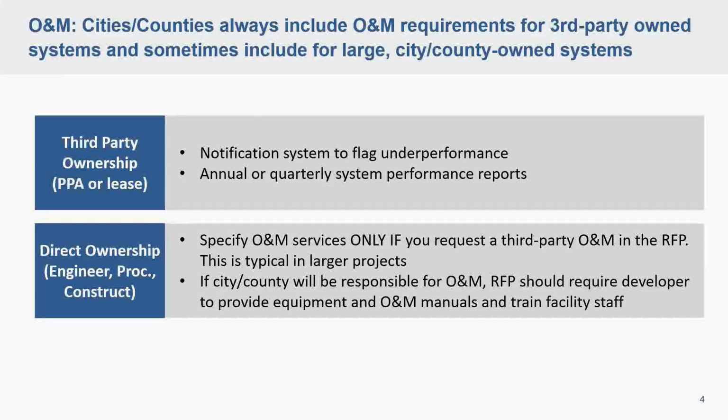So either way, though, if the city is going to be responsible for O&M, so the facilities managers are required to operate and maintain, the RFP should still require the developer to provide equipment and O&M manuals so that the facility staff can operate it accordingly, and potentially train the facility staff as well on that equipment.